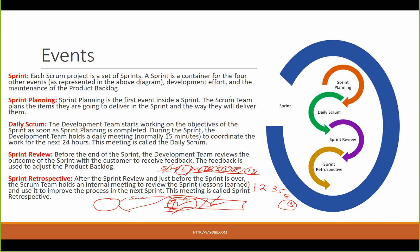We are going to discuss what you did yesterday, what you are going to do today and tomorrow. The development team starts working on the objectives of the sprint as soon as sprint planning is completed. During the sprint, the development team holds a daily meeting — normally 15 minutes — to coordinate work for the next 24 hours. This meeting is called the Daily Scrum.